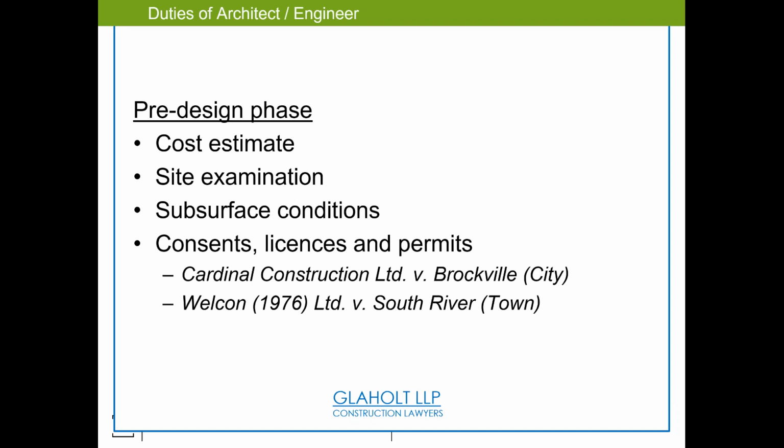So you understand, I talk a lot about project delivery, and next week's session is more of a project delivery fundamentals, if you will. I do this because in the BIM world, I've said if BIM is looked at outside of the realm of project delivery, then we'll have failure. So in the world of design, the American Institute of Architects defined the phases: pre-design, schematic design, design development, construction document preparation. That basically goes from 0% to 100% design, followed by bid, construction, and operate. All around the globe, any defined project delivery will have similar types of phases.